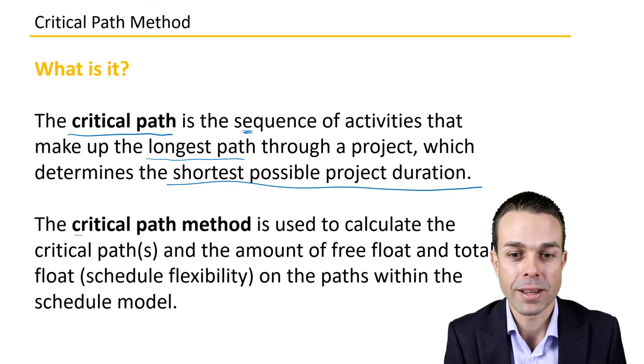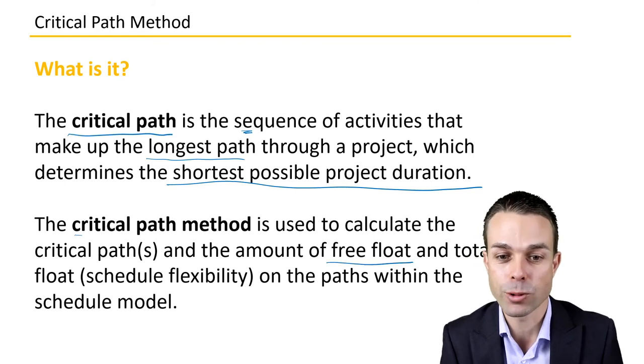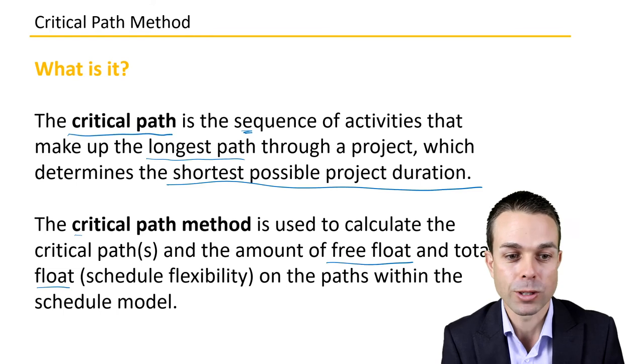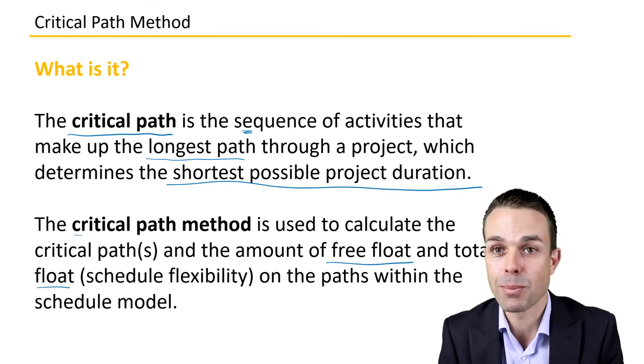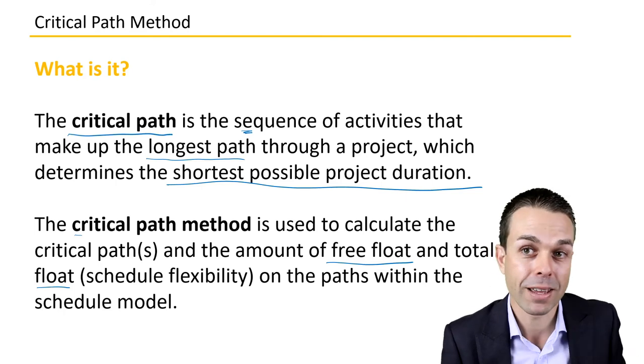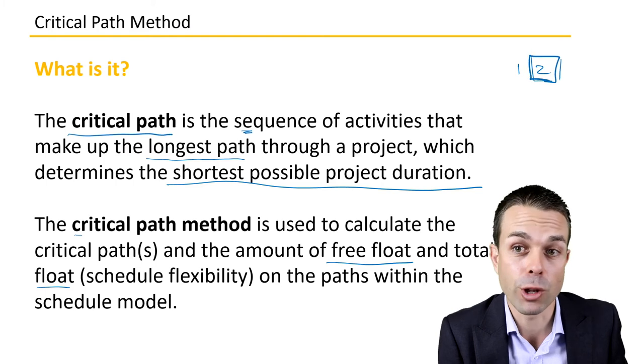So the critical path method is used to calculate those critical paths and the amount of free float and total float, which is the flexibility that we have in our schedule. So float being the leeway that we might have. Can we delay it by one day or two days? If there's two days of float, then yes we can.